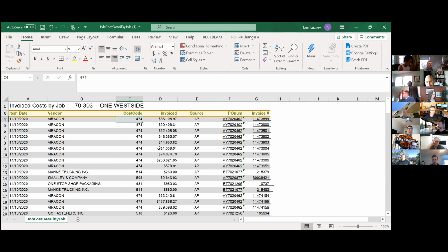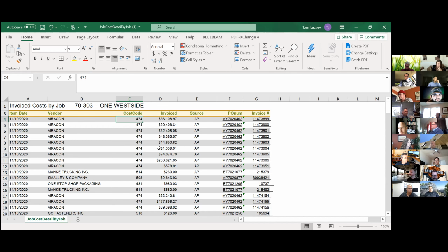That's the reason we have the deadline of the 10th for billings. Most of our billings are due the 20th, and they need those 10 days to get through all of our jobs and pull everything together: conditionals, unconditionals, invoices, and all that other stuff.